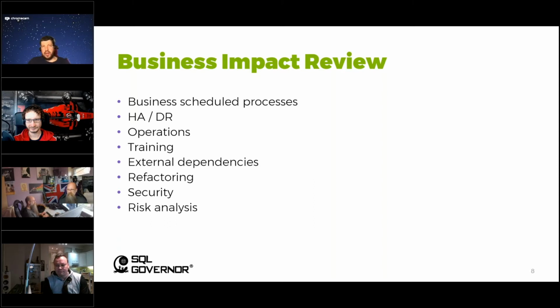Yeah, so this seems obvious, right? There are certain things you have to do at the end of a week, a month, a quarter, a year, whatever, and you wouldn't want any migration work to impact those. That said, I've been a part of a couple projects recently where the firm was large, so the person or the group sponsoring the project and sponsoring me executing it was not aware of all the different internal things, like certain teams had end of quarter, end of month things.